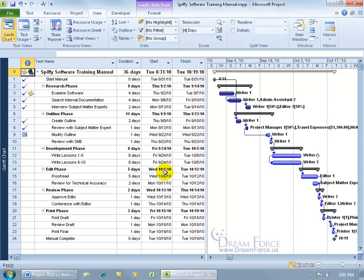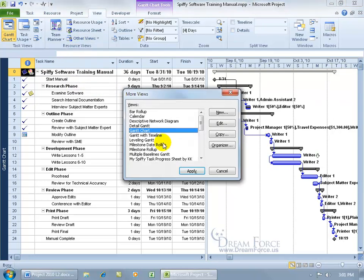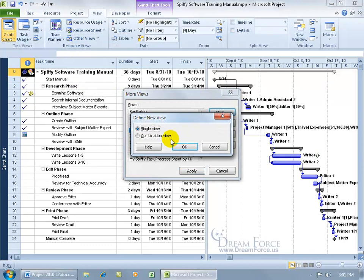To create that combo custom view, come back up here on the view tab, the resource views, click on other views and go down to more views and then click on new and then go ahead and select combination view, click OK.